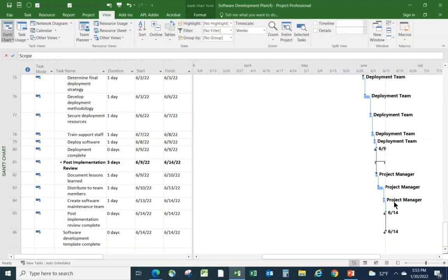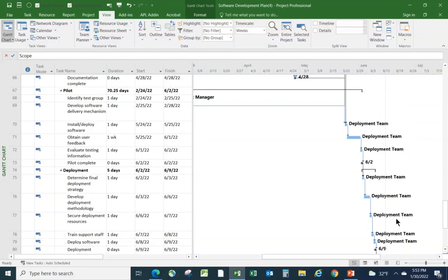So my assessment of this schedule is it's quite well put together. It's the type of activities I would expect to see. A couple of best practices are being complied with in here. For example, we don't have dependencies hanging off the summary tasks. It's not good practice to put dependencies on summary tasks for a number of reasons, not least that you can very easily end up with circular dependencies.